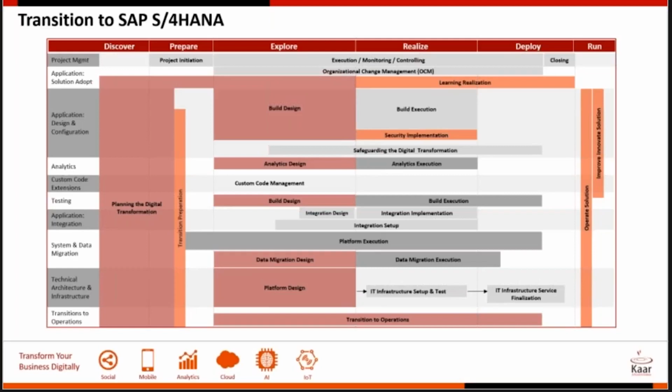So first, the discover phase. This is more like an assessment phase. And why would you do this? This is primarily to build a business case and get approval to actually start the S4 conversion. This phase helps you evaluate the complexity of the conversion and also the feasibility. So let's just quickly move on to the discovery and the assessment phases.